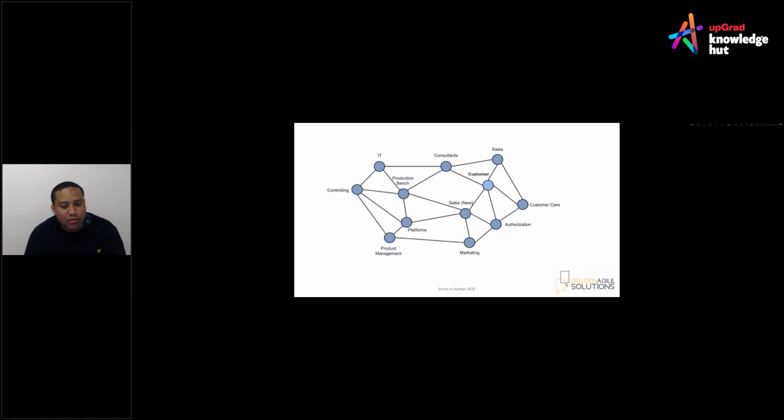And then you've got story points, which is loosely based on the Fibonacci series, where you've got 1, 3, 5, 8, 13, 20, and you use those range of numbers to show how much effort this work needs. Based on those story points, your Scrum Master is able to measure the velocity of how much your team can handle at any given time.